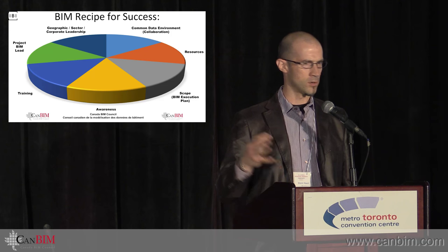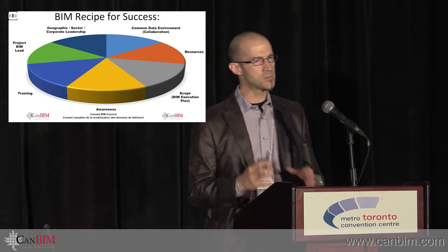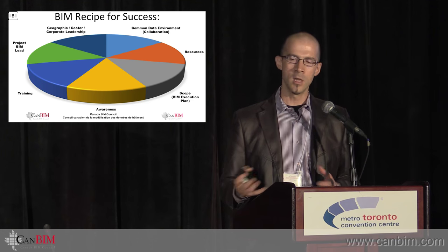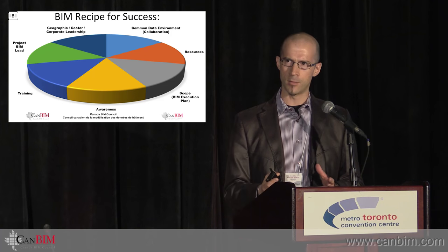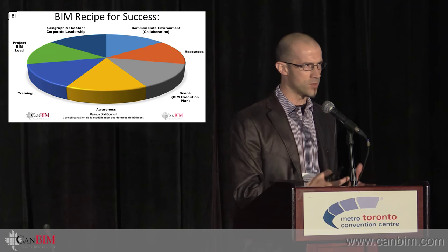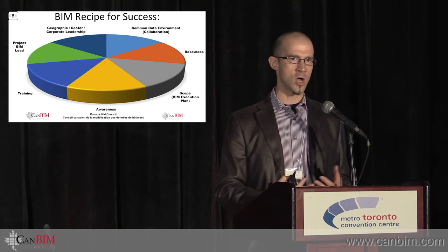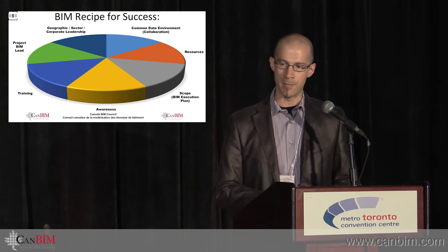Resources, your people, your hardware, your software. Project BIM lead is an important one for me. That's my single point of accountability for all things BIM on a project. They don't have to know everything, but they're that go-to person. They're embedded in the project. They're shepherding whatever the BIM goals are. They're shepherding the approaches, and they're reaching out to the contacts and the networking and the technical resources to help achieve it and make it happen.